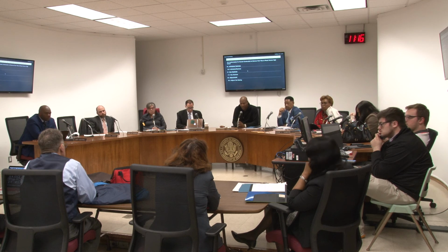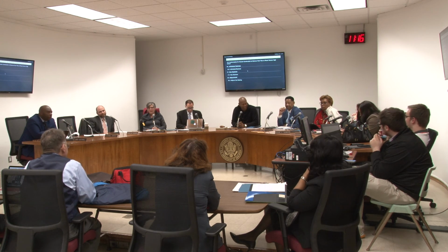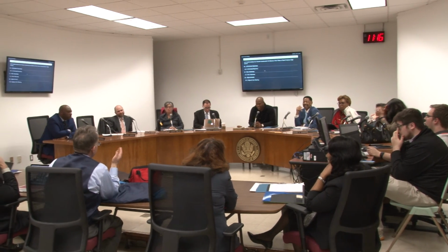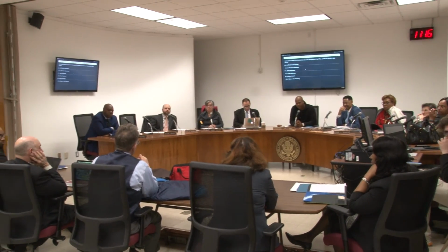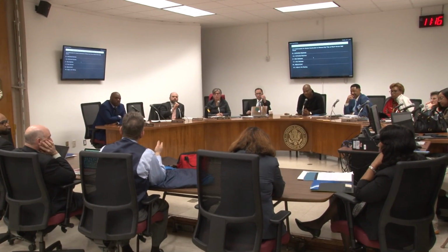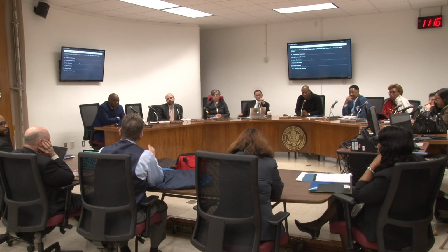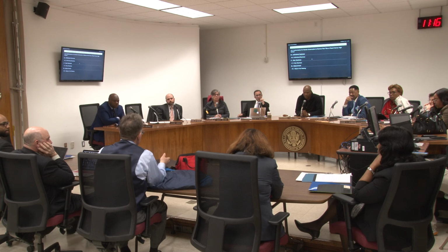Is that fairly accurate? Okay. So we rejected the bids, and then we asked for proposals from 2 people who already had state contracts. We're permitted to choose from people who have state contracts, and we chose one that we were very comfortable using. This is not for the replacement, it's only for the removal of the tile inside.